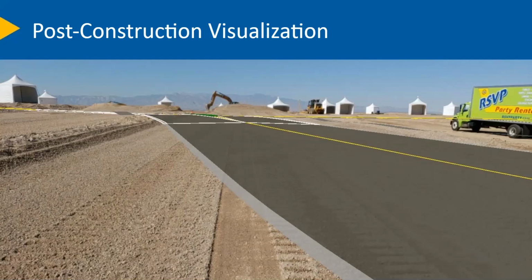Our team, using Sight Vision here, thought that there was a problem with how the road alignment was actually laid out in the field by the contractors. So by accident, Trimble Sight Vision was used to identify a discrepancy between what was intended to be constructed and what was actually constructed. And without seeing this, it might have been much further down the line when that was actually discovered.